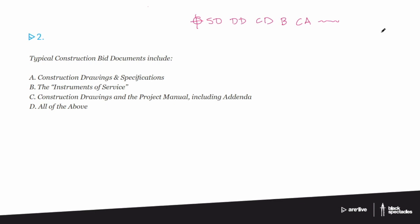All of it is legal. You have a contract to do certain work, so the SD and DD all has legal aspects. But the CD set, the contract document phase, is really this sort of legal understanding. And then once you're done with that, you're going to bid it out. This is a standard design bid build setup. If it doesn't say a project delivery, then you should assume design bid build. If it's about design build or about some other project delivery method, it'll say that specifically.